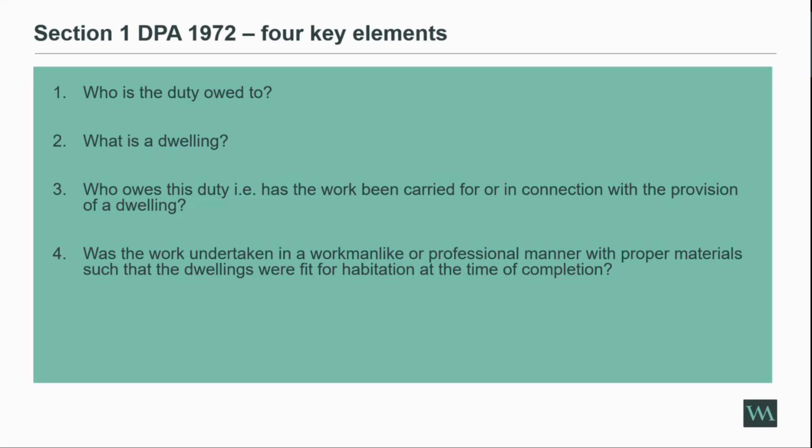And sometimes people can get a bit het up on this: just because something isn't costly to remediate, so even if it can be remediated at a relatively modest cost, that doesn't mean that there's no breach. You can still have a breach. It doesn't need to be a multi-million-pound remedial scheme in order for it to constitute a breach of the DPA. This is just a measure of damages.